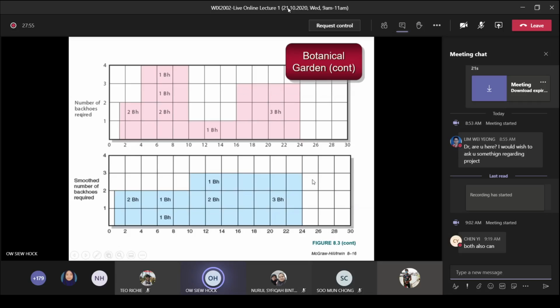You reduce the fluctuation. So this one is down, up, and then down. The original one is 2, 4, 1, 3. So you do the leveling, you delay with the slack activity you have, then you just become 2, 2, 3, 3. So that's called the leveling technique. So you look at your network diagram and see which is the best to delay the activity so that you reduce the fluctuation. So by doing that, also you don't need the maximum of 4 units, which you don't have.